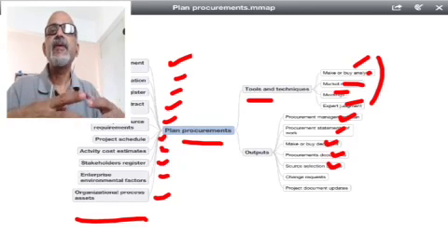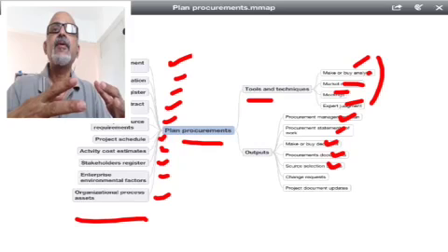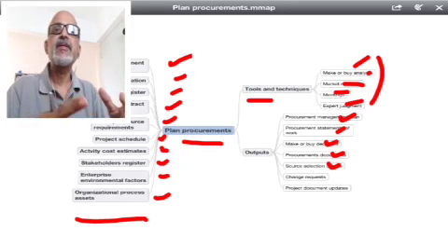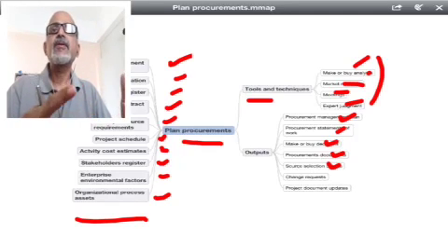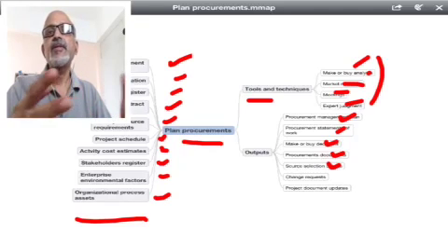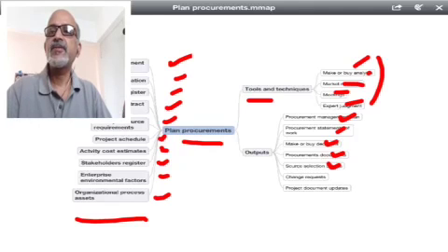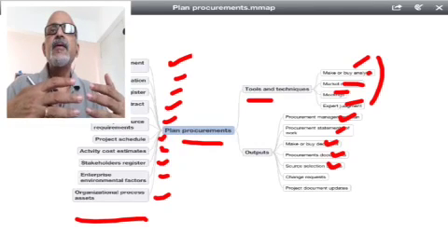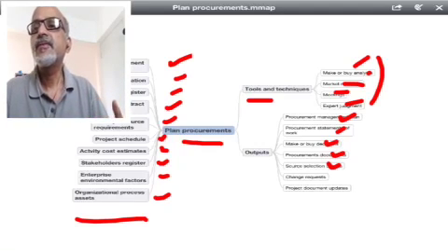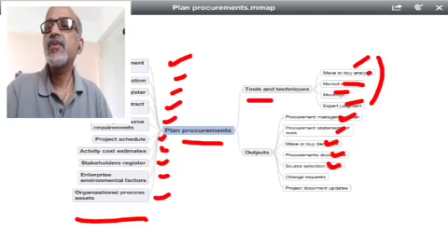Then we have the weighing criteria, like for experience, you give this much weightage. For your track record, you give this kind of weightage. For completion date, we give this kind of weightage. Even while recruiting people, we have this weighing criteria, like for qualification we give 10 points, for past experience we give another 10 points, and for joining time we give some more weightage. So you have to come out with a weighing criteria and a screening criteria. Primarily that comprises the source selection criteria.